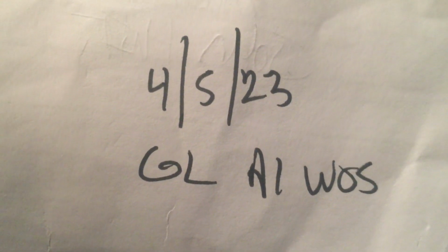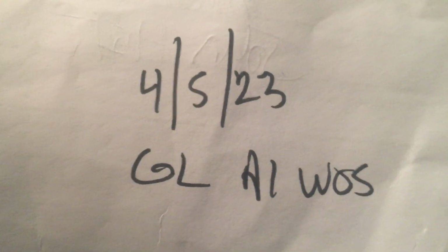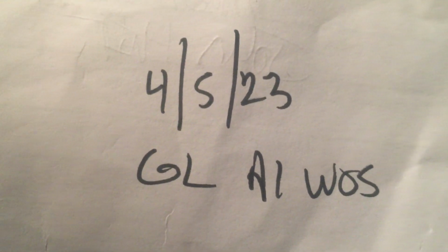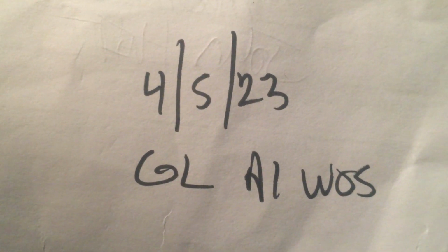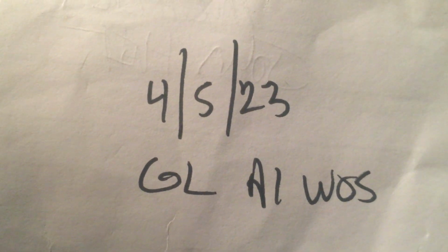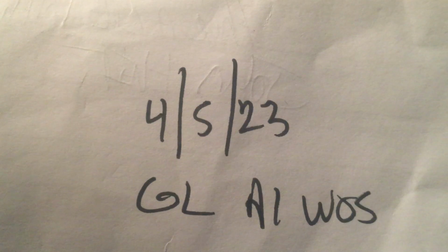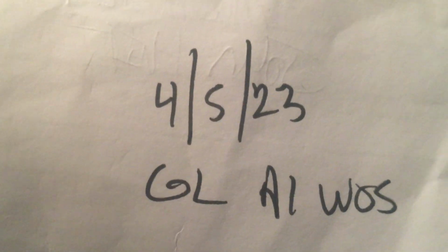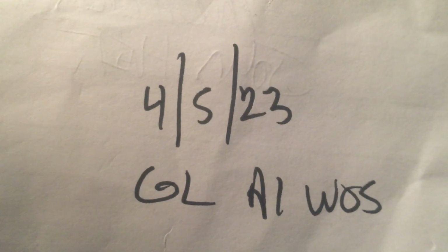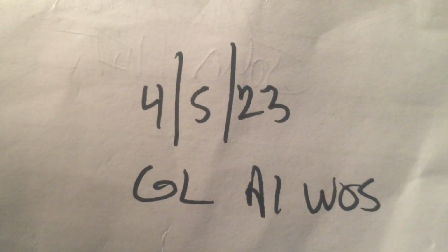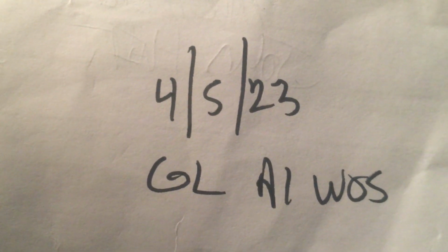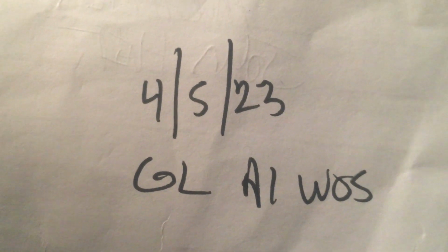And let's talk first about the concept of indemnity. Indemnity is to make whole, and insurance is a second concept. It doesn't cover everything that's in indemnity, but it's also to make whole. So who do you make whole? As the general contractor, you make whole the owner and the architect. And as a general contractor, who makes you whole? The subcontractors.